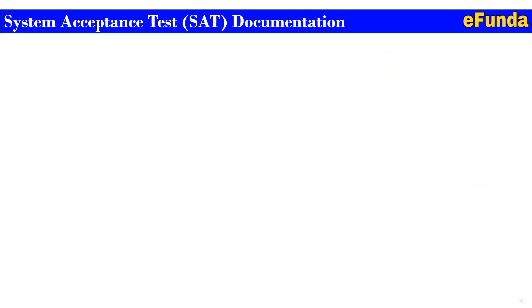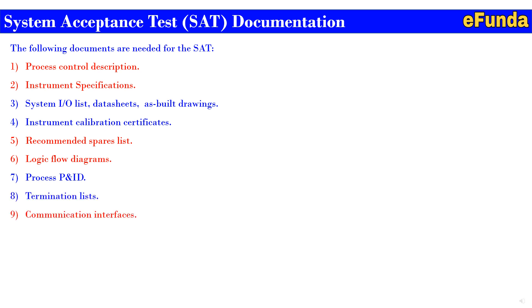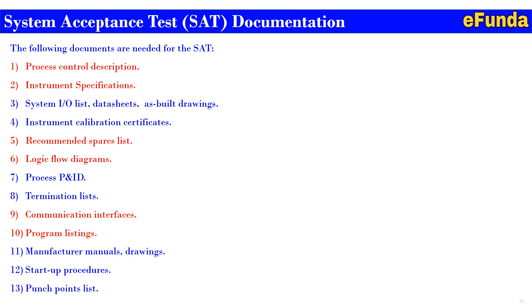Moving on to SAT documentation: there are several methods and types of SATs depending on the client and their installation setup. For the oil and gas or energy sector, typical documents needed include: process control description, instrument specification, system IO list, database and drawings, instrument calibration certificate, recommended spare list, logic flow diagram, process P&ID, termination list, communication interfaces, program listings, manufacturer's manuals or drawings, startup procedure, punch point list, and many others as per site requirements.